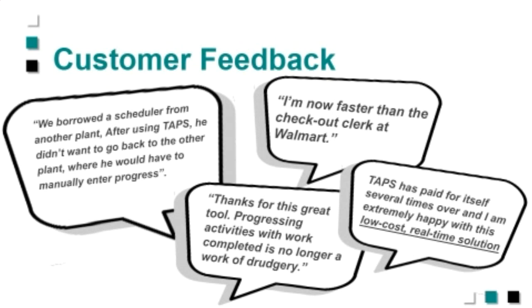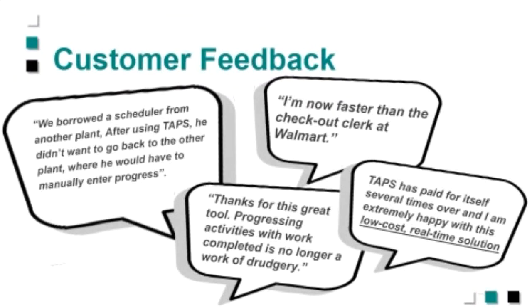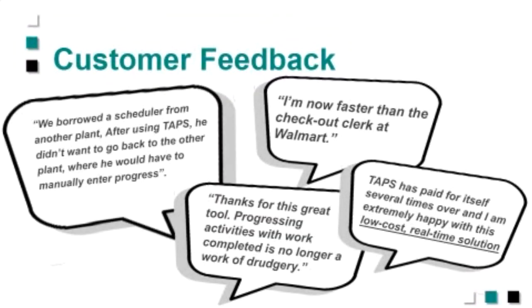Another one that I really do like is TAPS, and it's not on here, but TAPS allowed one scheduler to handle 2 updates per day and still have sufficient analysis time before issuing reports, when the original plan of 2 schedulers on the turnaround did not pan out. So essentially, they had one scheduler fall through, but the scheduler that they did end up hiring was able to handle it all by themselves anyway. So I think that's a really great story to see how much you really can cut down on hiring extra schedulers.